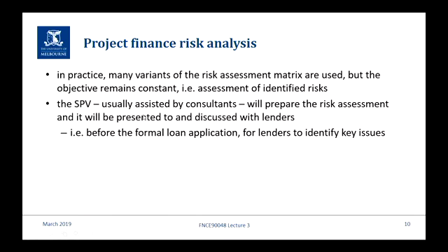So the SPV, usually assisted by consultants, prepares the risk assessment, and it's something that's presented and discussed with lenders reasonably early. Before you've done the formal application for project finance, you say, here's where we're at with our risk analysis. And the reason you want to do that is so that you can straight away zero in on what they're going to have problems with. If they're saying, well, your political risk is very high, our lending mandate is that we don't go into countries with very high political risk unless there's a specific mitigation, and so on. So there's going to be particular potential deal breakers.